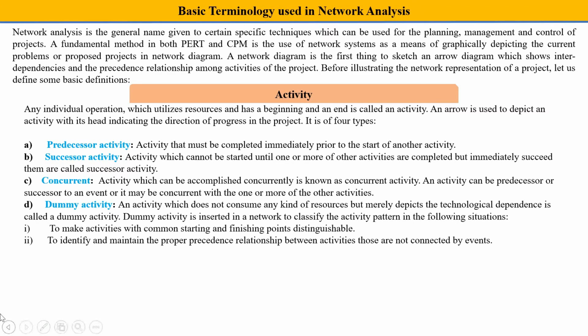There is a dummy activity, an activity which does not consume any kind of resource but merely depicts the technological dependence, is called a dummy activity. This kind of activity does not consume any resources whatsoever. It is only to show the completion of the chart, to make activities with common starting and finishing points distinguishable, and to identify and maintain the proper dependence relationship between activities that are not connected by an event.